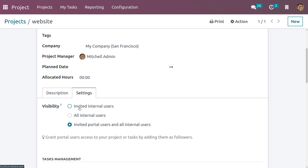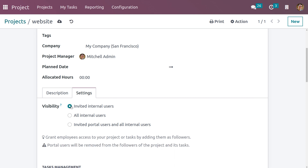You can set it as 'Invited Internal Users' so that only invited internal users can access the project. If you set it as 'All Internal Users', then whether a user is a follower or non-follower, they can access the project. If you set 'Invited Portal Users and All Internal Users', then all portal users as well as all invited internal users can access the project.